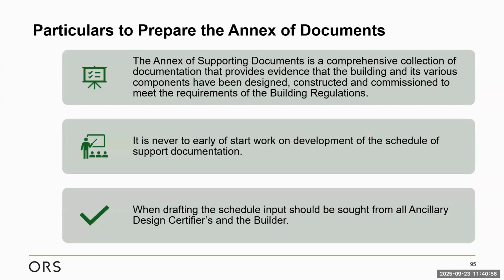Okay, we're going to move on then to particulars to prepare the Annex of Documents. The Annex of Supporting Documents is a comprehensive collation of documentation that provides evidence that the building and its various components have been designed, constructed, and commissioned to meet the requirements of the building regulations. Again, I would say it's never too early to start development of this schedule.